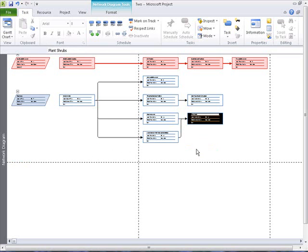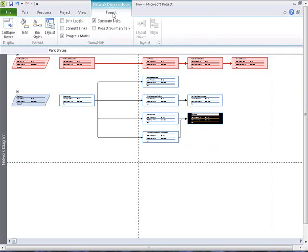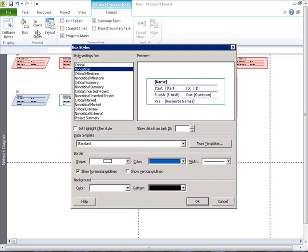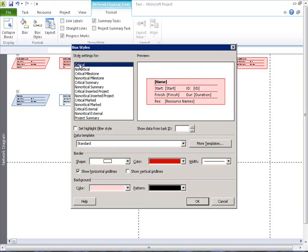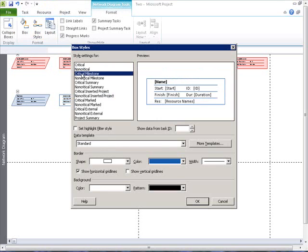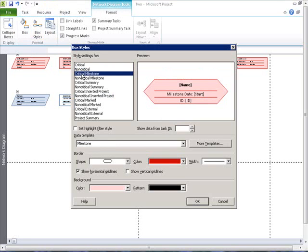Change the way the network looks by selecting the format tab. Box styles control the shape, color, and data content. We can designate different formats for different types of tasks, for example: critical, non-critical tasks, critical milestones, and so on.